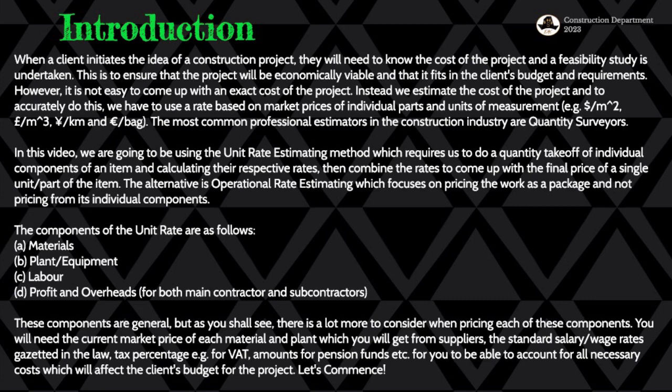That's a very important point to avoid overpricing and to avoid designing things that are out of date, which means even architects need to know the materials that are in place so that when estimators are pricing, they don't price with materials that need to come from abroad, because that's an extra cost. Transportation, you're going to see that transportation is another cost. So you have to make sure these things are local or they're locally found.